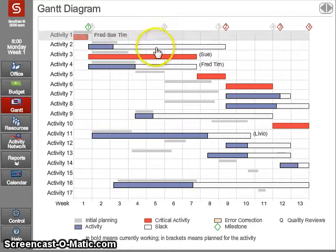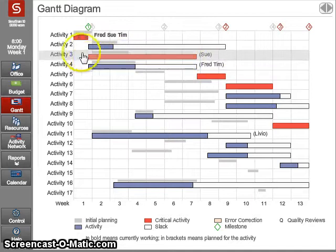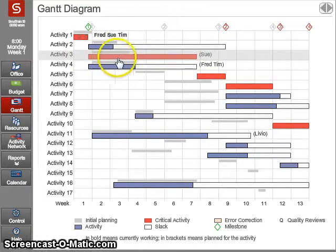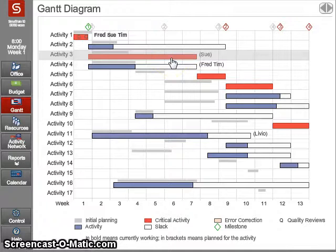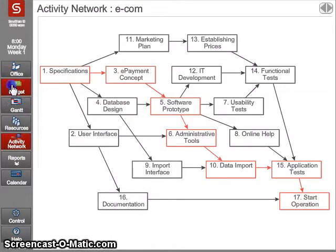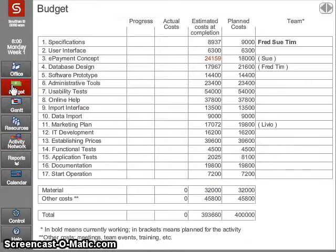You'll see some people have already been assigned to tasks, and the grey bar is the original plan. But when they assign people, maybe the critical path gets longer because, for example, maybe somebody has been assigned when they're not available. The people available to us are shown here, and we can see the activity network here, and we can also see the budget. All those databases are updated live as we make assignment changes.